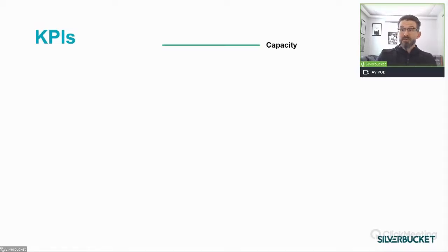And we are starting with the capacity, which is the green line in our simple example. The capacity is a theoretical maximum. How many hours is the entire personnel able to do during the regular hours?